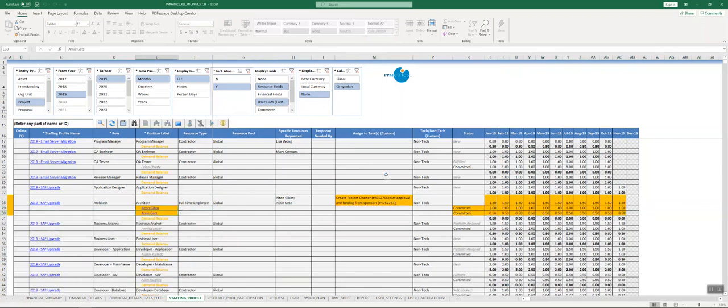And you can see the XLI doing its magic. It's added Alton Gibbs and Arnie Getz as assigned resources and committed them, and at the same time populated their assignments based on available capacity. It turns out Alton Gibbs is completely available, so you can see right across the board 1 FTE all the way from January through November, and the rest goes to Arnie Getz. Now I'm going to save all my changes back into PPM by clicking on the little disk icon.